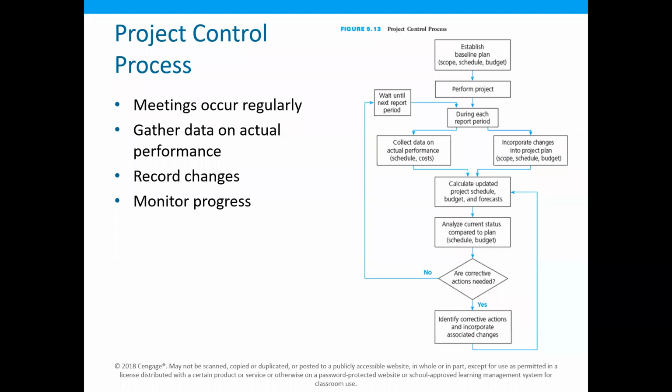It is recommended that a regular reporting period should be chosen. And the frequency of the reporting period should also be chosen very carefully. If a project is for a long duration, then it may not be necessary to have the reporting period very frequently.